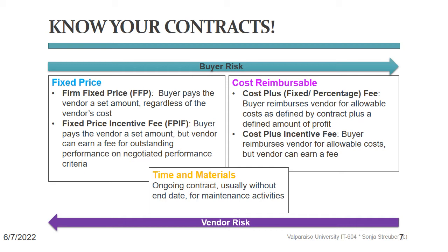Basically, when negotiating how to structure a contract for your subcontractor, you will want to consider the risk to you as the buyer, and the subcontractor will consider the risk to them as a supplier. The risk to your project will be that the subcontractor delivers their work late or with insufficient testing or quality, or that they hold your product hostage, saying that more work than initially agreed upon needs to be done because you may have changed your mind, or they may have found out more details than anticipated at the point at which they signed the contract with you.